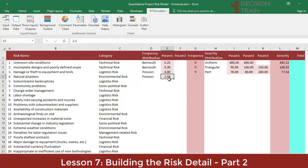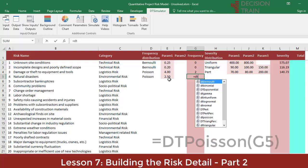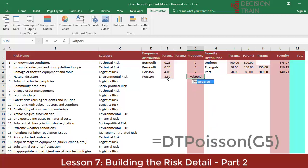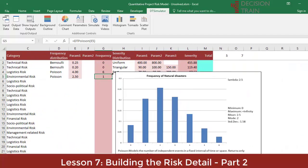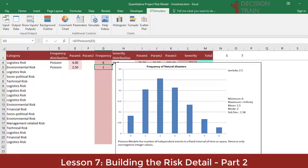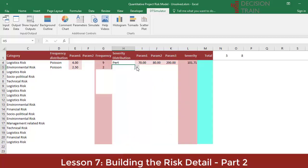Note that the value of this parameter does not necessarily have to be an integer. In this case, it is just the average between 2 and 3. With the cursor on G5, the frequency graph for this risk would look like this. To model the severity of this risk, we will use a gamma distribution.